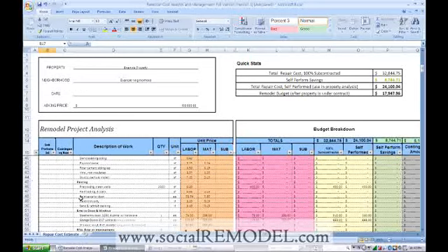So let's go down to painting. So painting 3 coats, put an X here. Actually, we need to change that to 2000. Put an X there because we think we can paint the exterior of the building ourselves. But what you'll notice is now we have a line item here for 100% subcontracted. That is, if we are to sub out the entire painting job to a painting subcontractor.